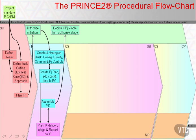The PID and the Next Stage Plan are presented to the Project Board for two decisions in two activities. Authorise the Project considers the PID, while Authorise a Stage or Exception Plan considers the First Delivery Stage's Stage Plan. The Official Manual describes these as two separate activities, and explicitly makes the point that they may be as informal as the participants prefer. In reality, both activities are pretty likely to result in a single conversation, and probably a minuted meeting.